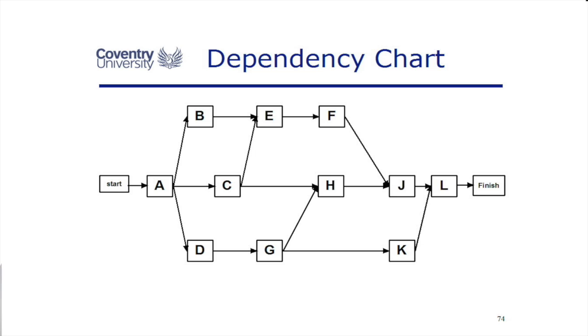Here's an example of a dependency chart. We've got a start task, we've got a finish task, we've got no loops, we've got no dangles. The start of the project, I can do task A. When A is finished, I can do tasks B, C, and D. I can't do E until B and C have finished. It's a dependency chart for the project.